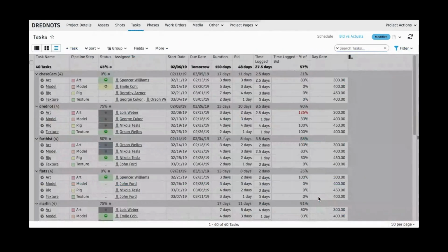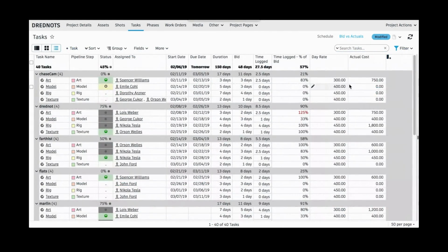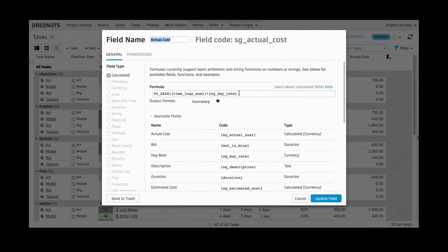One of the other things that's really cool about the way that reporting works is we can also do reporting on a micro level as well as a macro. So in this case, maybe I've already predicted the amount of time that a task will take, and I want to compare it to the actual time that it took. So I could have my artists or my team members log their time against particular tasks in production tracking. And then it would allow me to see whether or not we're staying on budget.